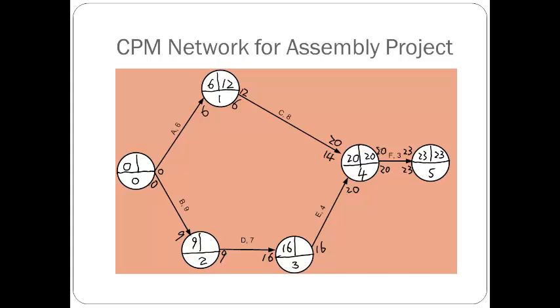And we can keep going. The 12 is the latest finish time, you read from here and take 6 days. So that means for your activity A, you can actually just start on the 6th day, and you won't delay the activity.